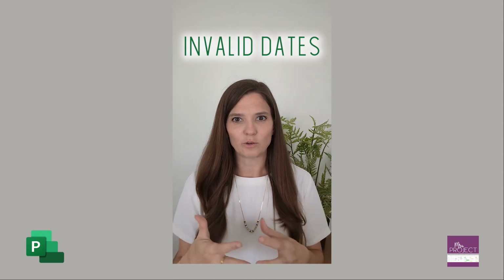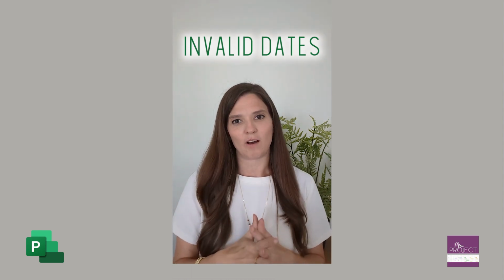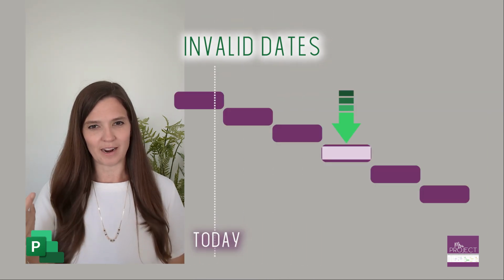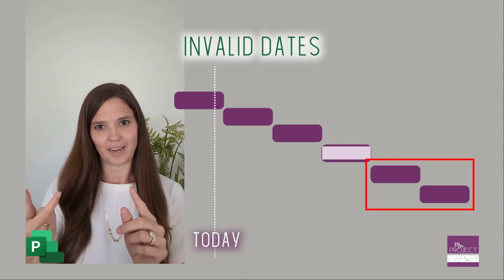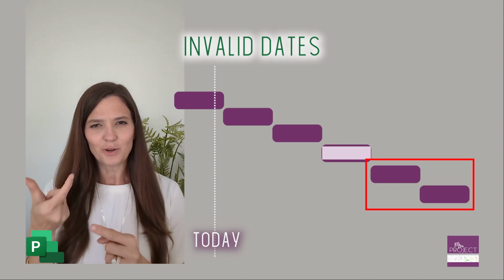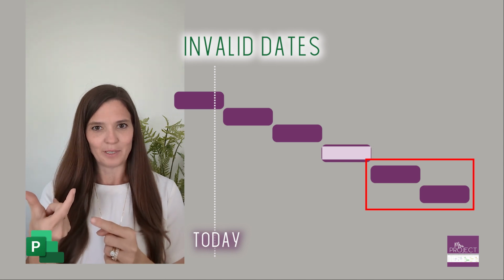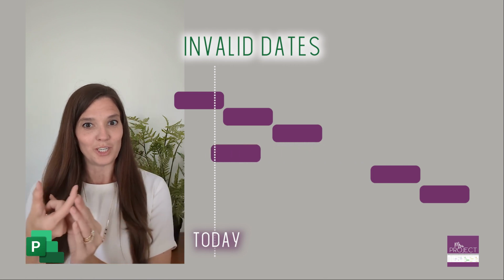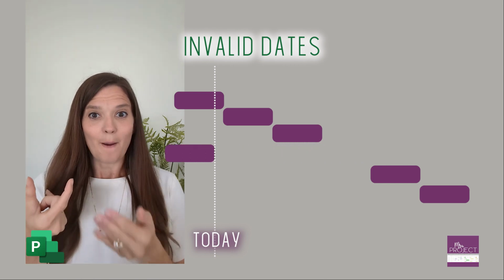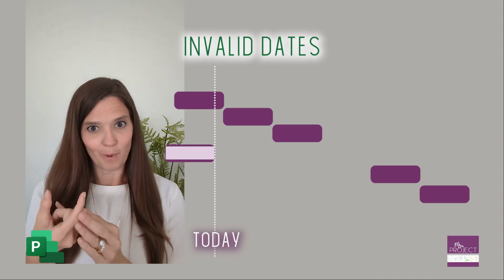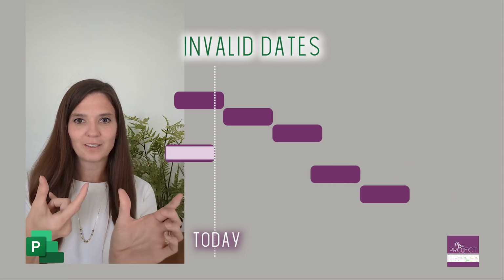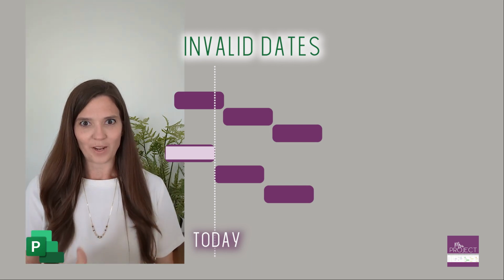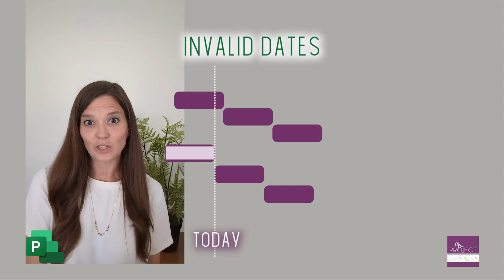And the ability for the schedule to flow and be dynamic is lost. It's all about the dependencies that we have created. If a task that's in the future is done, all those tasks that were linked to it to say they happen after this one's done, they're still waiting for that future date to happen. So they can't happen. So the dynamic part of it that we want is that when you shift a date and it is completed early, mark that date accurately before you mark it complete, and then it allows all those successors to pull in with it. Now you can easily predict what the whole project is going to finish with.